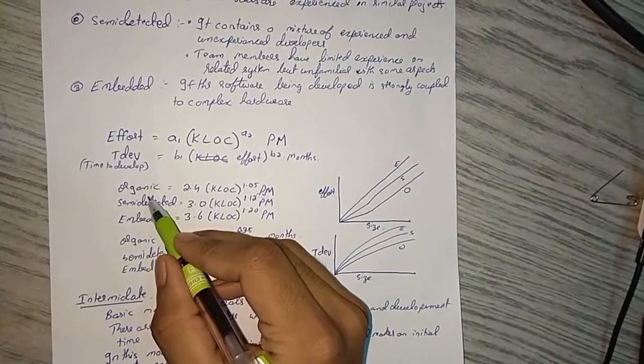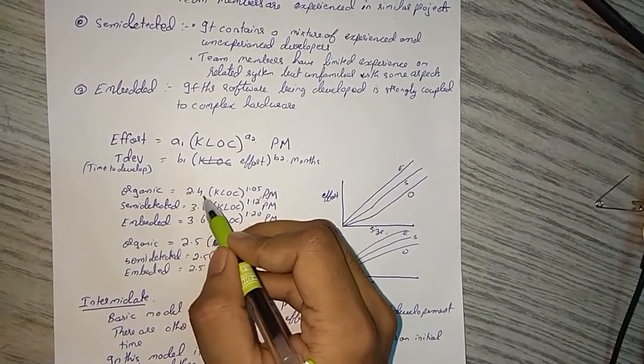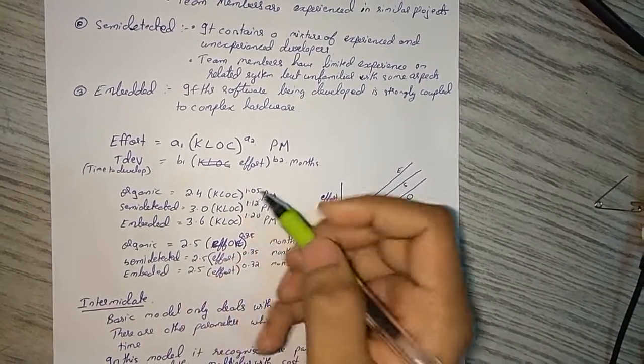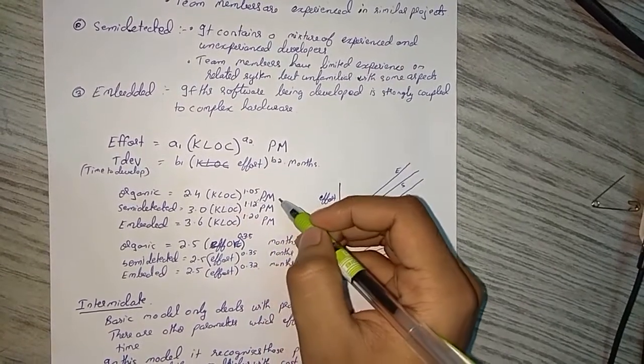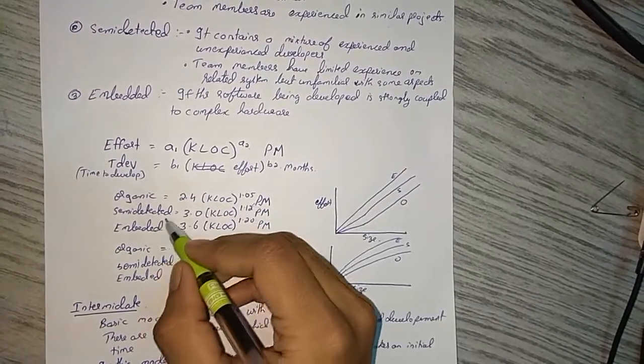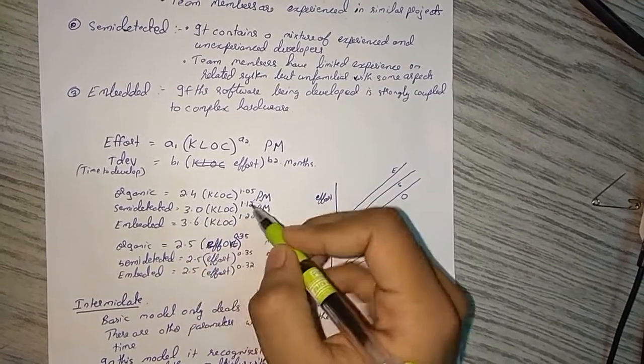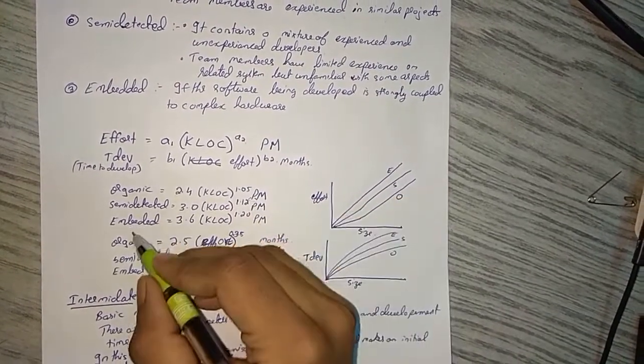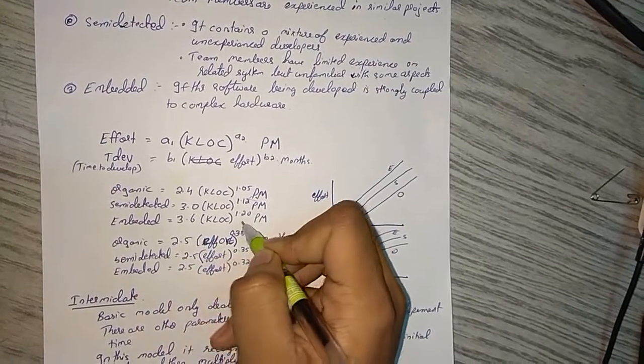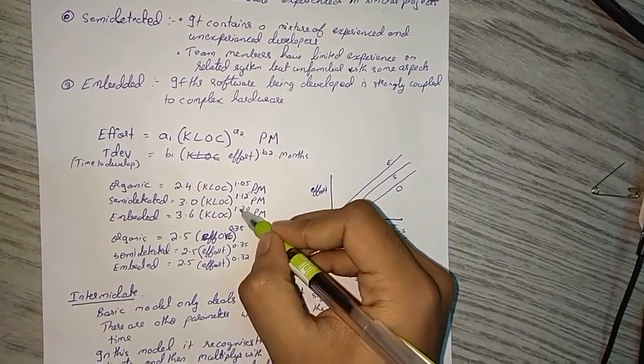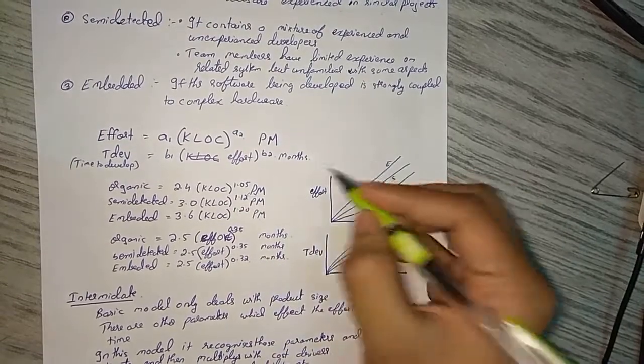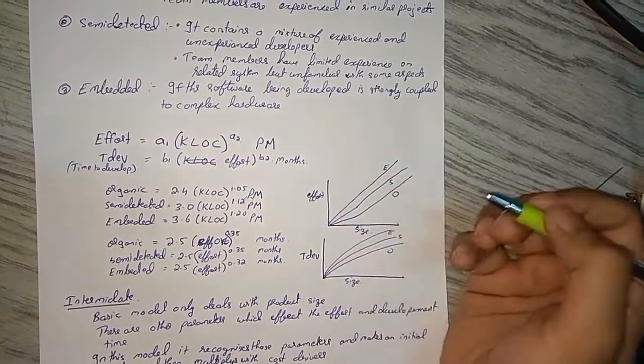So first we have organic: organic is 2.4 times KLOC raised to 1.05 PM. Semi-detached is 3.0 times KLOC raised to 1.12 PM. Embedded is 3.6 times KLOC raised to 1.02 PM. PM is what? Person per month.